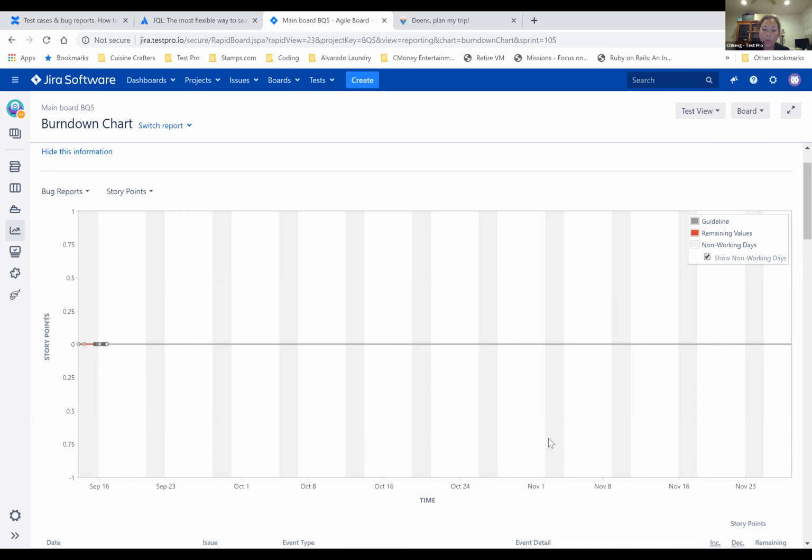This tells you how many stories QA is passing. So overall, the company can see how many actual stories are getting done and completed. That's what a burn down chart is: simply how much work QA, and the entire team, is getting done, but mainly once QA passes it is when the burn down actually moves. It's up to us to make sure a story actually meets the user story, the requirements.